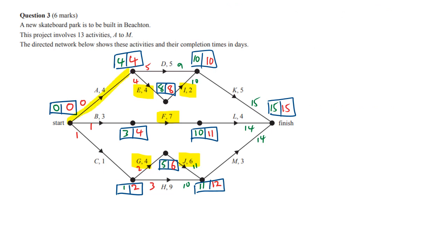So this is our critical path, remember? So normally when you try and crash things, you try and crash the things that are on the critical path. But also remember what we said, that this only has a float of 1, so there's 9 and 10, and that's going to be important. So when we're looking at crashing this, we've only got a float of 1 on that orange path. So we could crash E by 1, that'll make that 3, this would be 9, and now the two 9s are equal. We've got 2 critical paths, and no further crashing is useful.